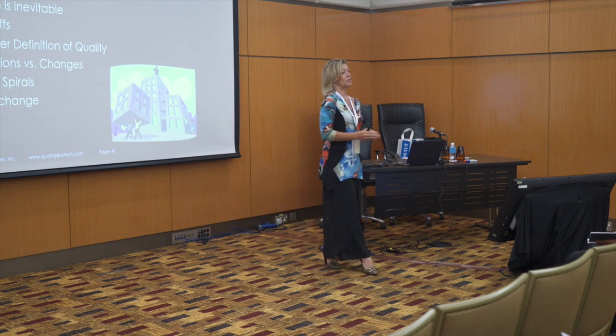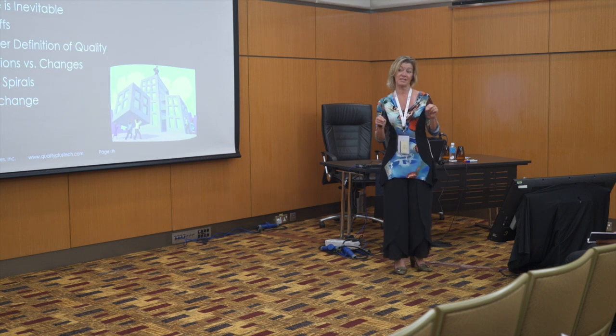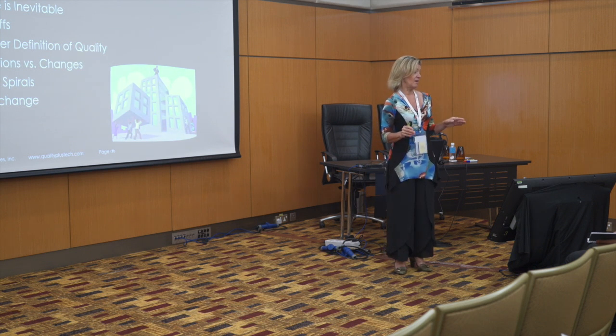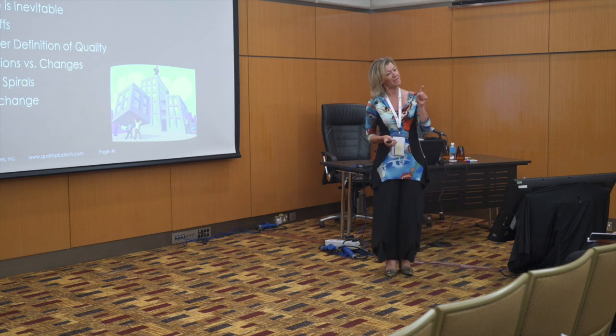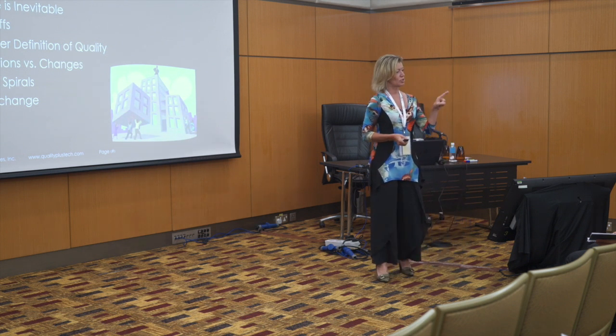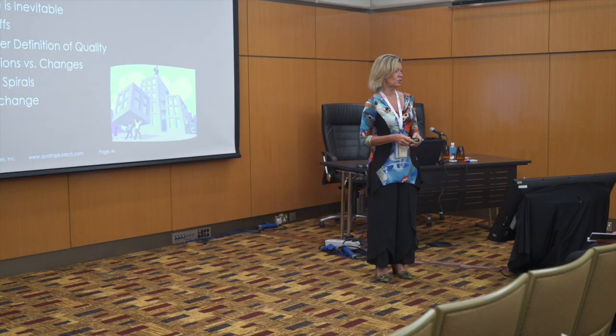Rework is when you start working on something, and what happens when you're partway through? You have to do it over again. Rework, and this is a number that just always astounds me. Rework accounts in some of the governmental departments in the United States for 60% of software development work effort. That means on Monday, Tuesday, we go in and we do really great work. And what do we do Wednesday, Thursday, and Friday? We redo it. That's huge.